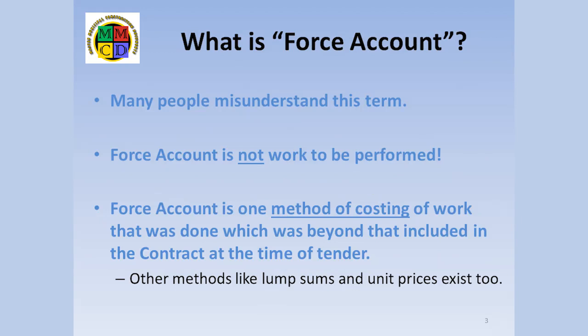Before going further, I want to clarify the term force account, as many people misunderstand it. It is not work that is to be done or is being done. Rather, it is an accounting method by which that work is to be costed for reimbursement. Normally, its use is restricted to items which, for whatever reason, were not included in the original contract. Occasionally, some items are intentionally listed to be done by force account when the scope, timing, or difficulty cannot be predicted.